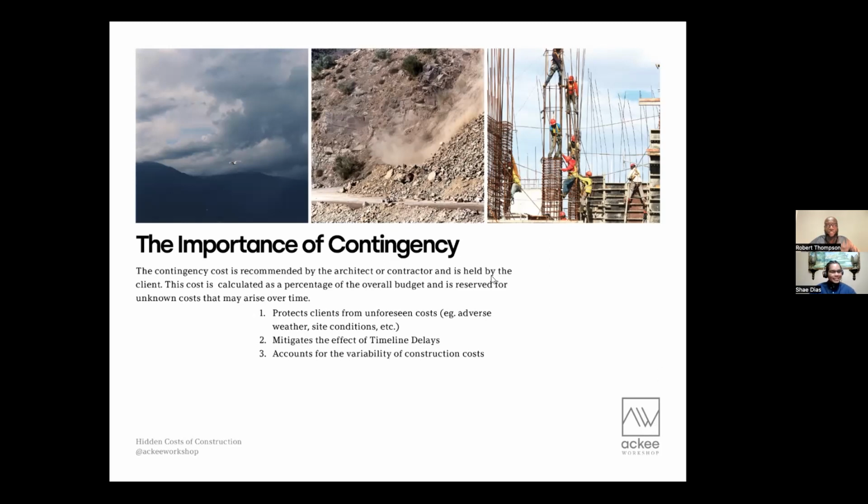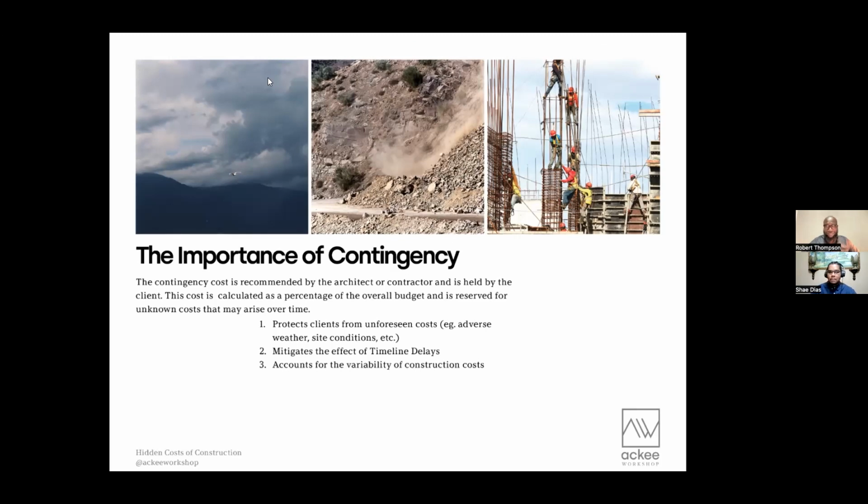Of course. Let's say you're building your house and you're renting, and the contractor said they're going to take 6 months. But if it's raining 3 months of the six, now you might have an additional 3 months you need to work. You need to give them an extension of time. So that's 3 more months of rent you have to pay. So that's where your contingencies will come into play to kind of help you stay out of trouble.